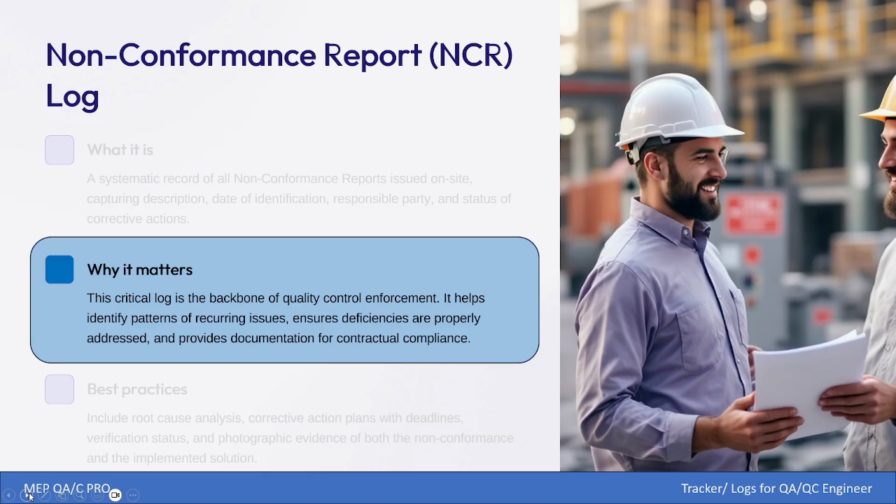That helps identify why we are getting NCRs repeatedly for the same issues. From there you can give feedback to your team that we are receiving unnecessary NCRs based on repetitive issues, so we need to stop at site and close with contractual compliance and corrective action, in order to avoid any further NCR for the same recurring issues.